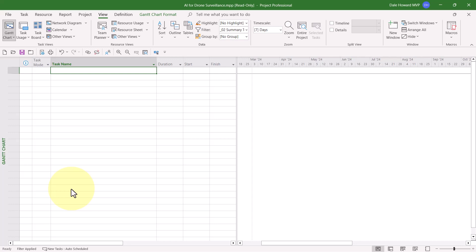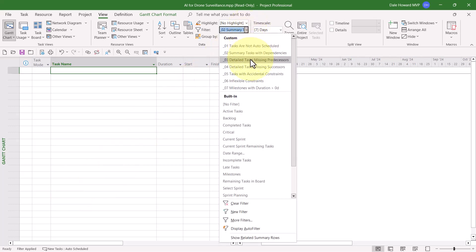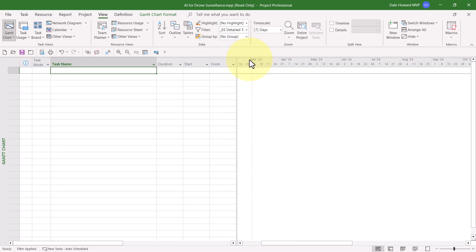Now let's take a look at the third filter. This is Detailed Tasks Missing Predecessors. It has a companion called Detailed Tasks Missing Successors. So let's take a look at both of these. First, Detailed Tasks Missing Predecessors. In your project, there will always be one task that will be returned by this filter, and that will be the very first task in your project which can never have a predecessor because it's the first task. So if you only see one task, you're good. If you see other tasks, then you're going to need to link them with other tasks so that they do have predecessors.